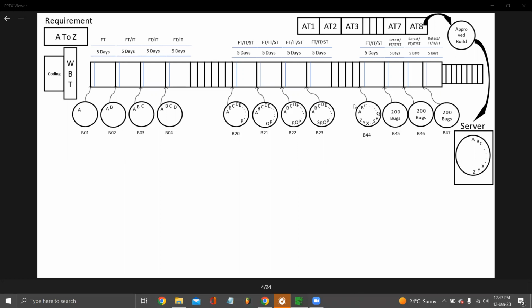Now, acceptance criteria have multiple things. They can ask you to have like 95%, 99% of test cases passed. This could be a criterion. They can tell you that this number of major and minor bugs are allowed, but no blocker or critical bug should be there in the software. And they can tell you that the system testing should be done properly, basically in an environment similar to the production environment.